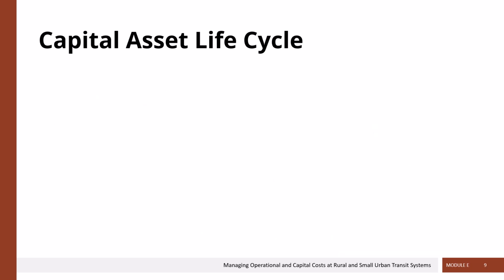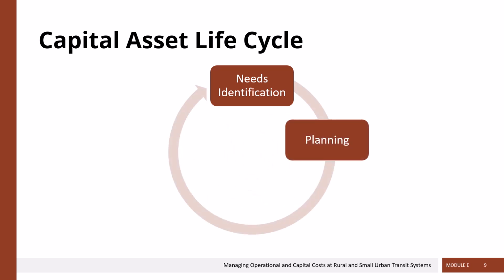Let's talk a little bit about the capital asset life cycle. Every capital asset really begins with identifying the need. This is needs identification, the process of determining what capital assets are needed, how many, and that's usually based on your level of service or on your current assets, in order to figure out when they need to be rehabilitated or replaced. Once you identify the needs, then you can begin the planning process, taking those needs and putting them